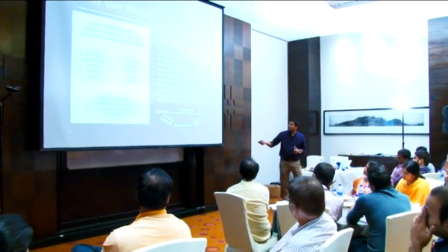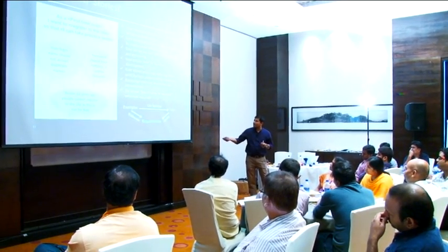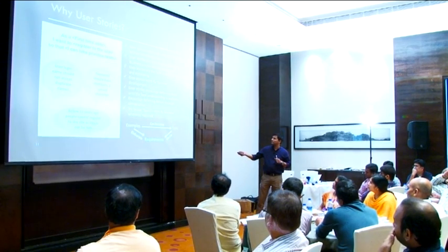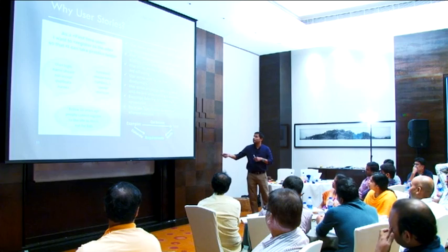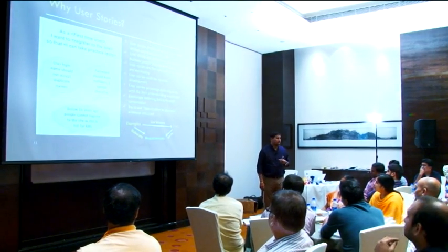So what you are doing here is creating examples which will help you elaborate the requirements, and at the same time help you create your test cases. Those test cases will help you validate once you implement the requirement. This is called specification by example.